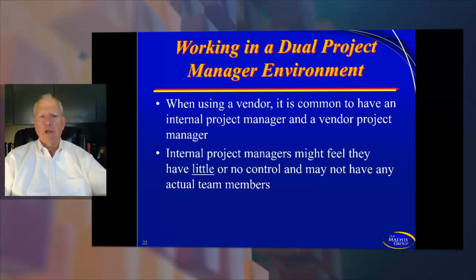You'll see this in government, especially when you hire a vendor to do most of the project, if not all the project. You'll have an internal project manager who's working for, let's say, the government or the state of Kansas, and yet the other project manager works for the contractor, and all the contract personnel work for that person. So an internal project manager for the state of Kansas might feel they have little or no control over the vendor contractor and contract workers because they report to the vendor. And of course, that's absolutely true.